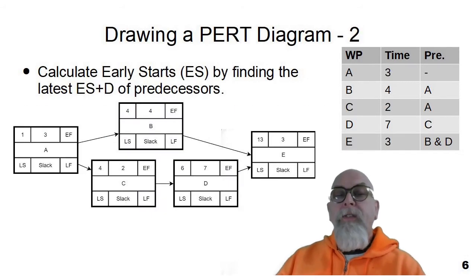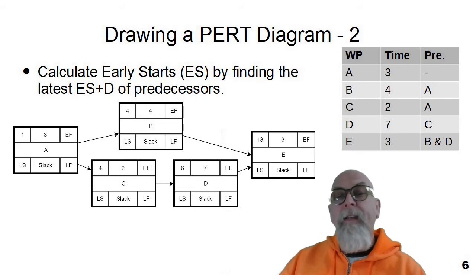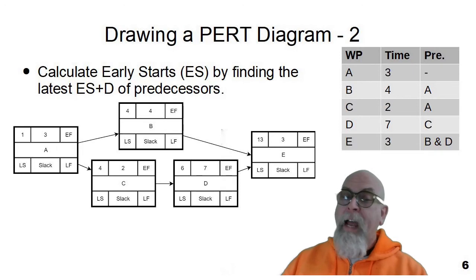You can see that I've now added early start to all of the other tasks in the network. The early start is calculated by finding the early start plus duration of the predecessors and you put the latest of those. So you can see that on box B, one plus three is four. So if we spent three days, day one, two, and three on task A, then we can start B at the earliest on day four. The same with task C, task C can be started on day four.